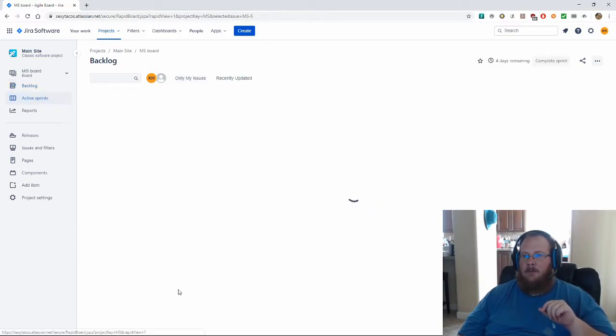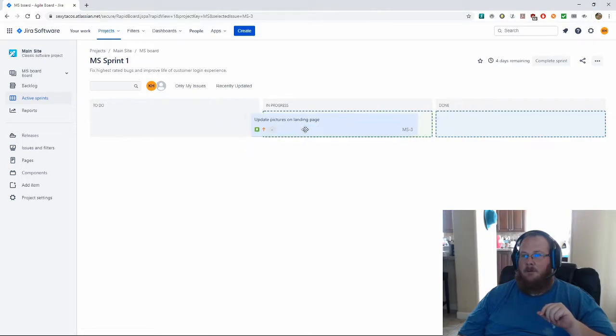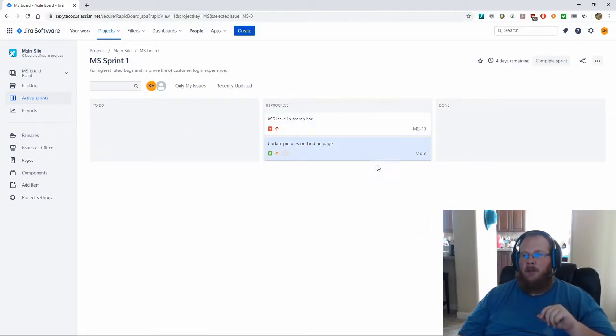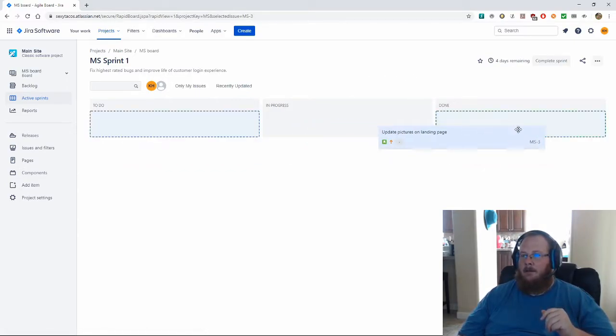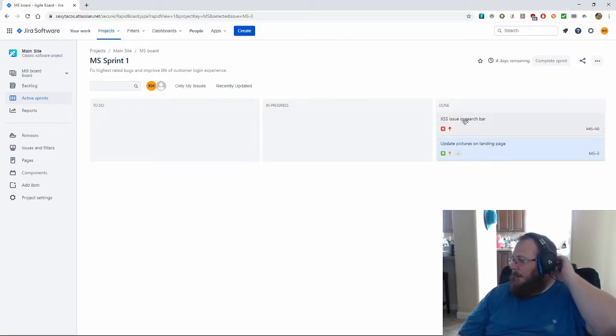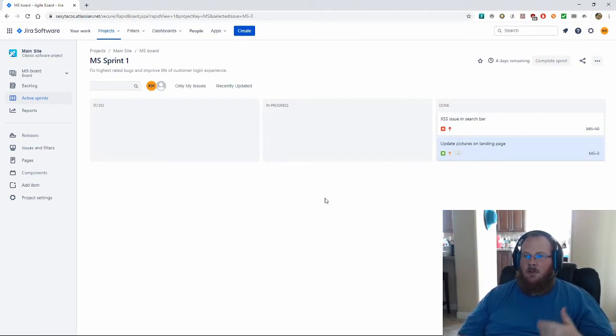And so then we go back to the sprint. The developer grabs this issue, pulls it off the board, and both developers work until the end of the day, and say the next morning, Friday, they get everything done, move it over into done, and they are good. And then typically they'd spend Friday looking at how the sprint went, take a look at the caveats, the good things that happened, the bad things that happened, things they learned, identified any kind of process issues or constraints they came across. And that would be it for Friday. And then Monday, you'd start the process over again with planning and putting things into an active sprint.